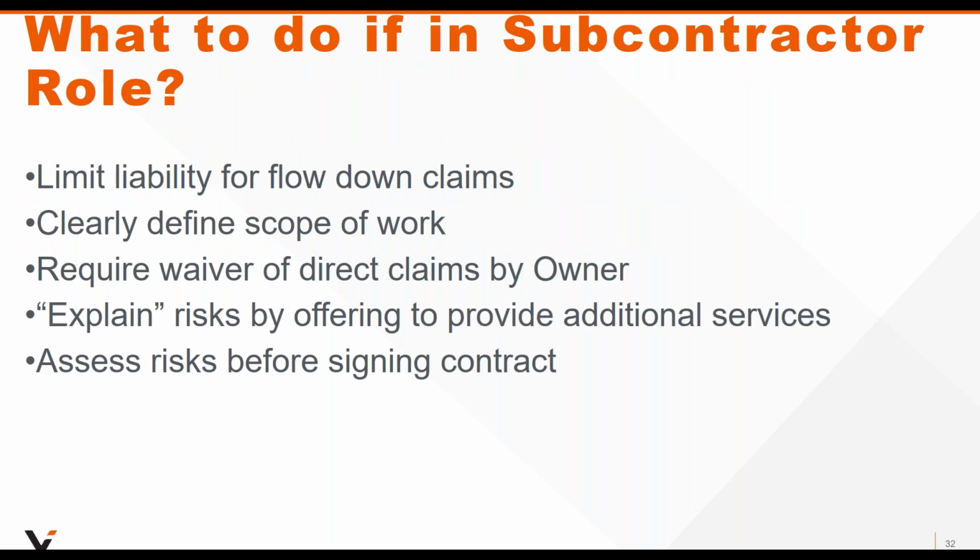So what do you do? You want to limit liability for flow down claims. The contractor may well have these broad responsibilities for warranties and assuring certain outcomes, but you don't want to be in a position of being responsible for those just because you have a subcontract relationship. You should be able to carve out your responsibility and clearly define that scope of work that we talked about, right? You need to make sure that you clarify the services that you'll be providing.